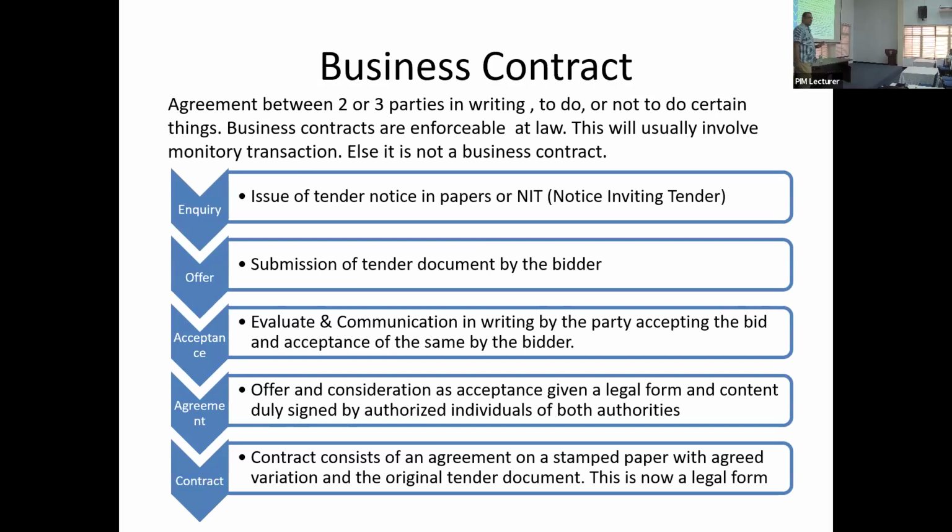So in a project, normally, when they call for a tender, we follow a certain procedure. Right? So first of all, you will see in the newspaper a tender notice. They call the notice inviting the tender. It's only an invitation. We have seen enough and more tenders. Then you submit your proposal. That is your offer.